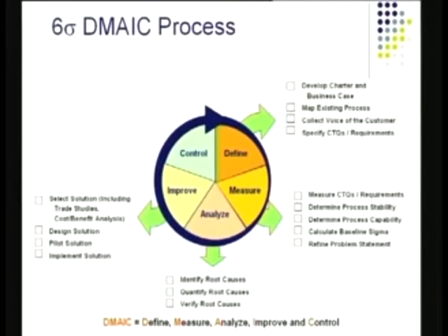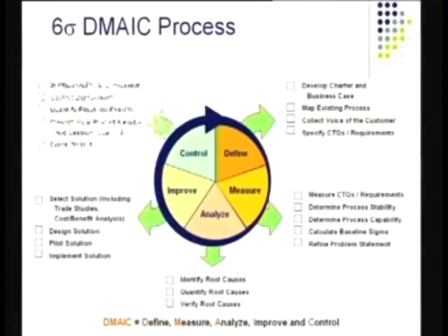So in the improve stage, I'll have to select the solution. I'll have to design the solution. I'll have to pilot the solution. I have to make sure I demonstrate that on the shop floor, and then I have to implement the solution. These things will have to be done right at the improvement stage.